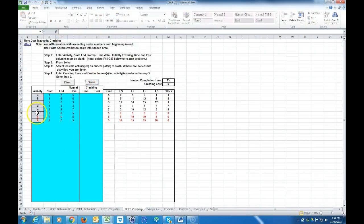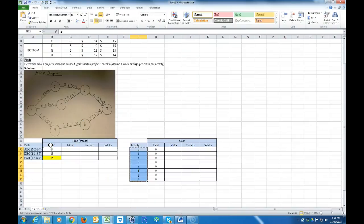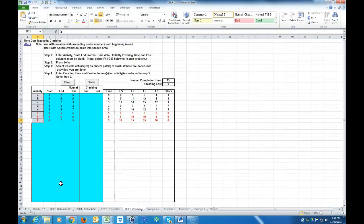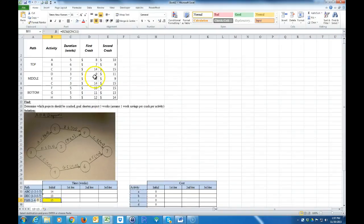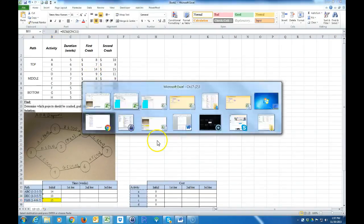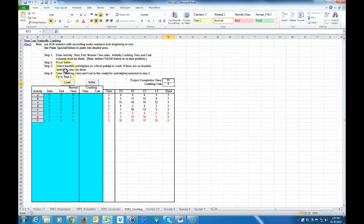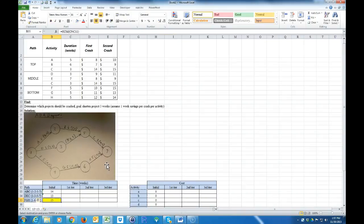It solves and shows the critical path is F, G, and H. We already know that because it takes 15 weeks — that's why I highlighted it in red. It says the cost is nothing because we haven't done any crashing yet. So that's my initial state. Now it says: select the feasible activities on the critical path to crash, and if there are no feasible activities, you're done. So we go on to our first iteration to lower this 15.